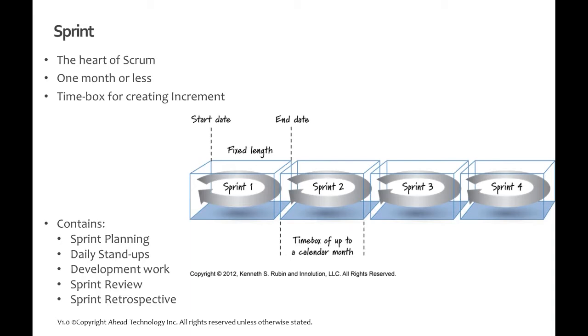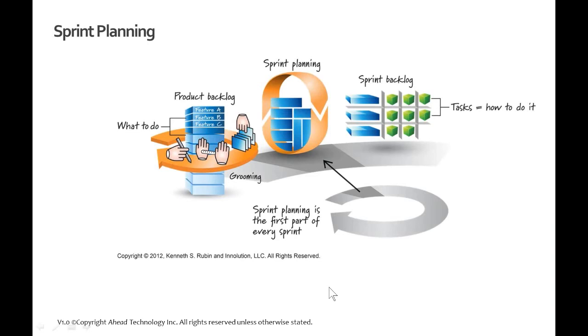Do we do 2-week sprints? Do we do 3-week sprints? Do we do 4-week sprints, etc.? Don't go longer than 4 weeks. Otherwise, you're starting to get more into a more traditional waterfall and or project managed approach as you work through. There are some rules around here, and the rules are important because they do facilitate this agility that we're all trying to achieve, this responsiveness to the business.